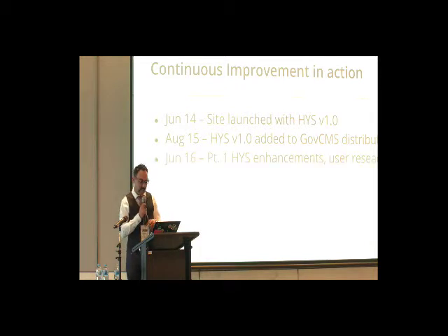And what we did then, about a year later, was create some enhancements. The first phase of that was to actually do some user research. We were able to carry out the user research with a specialist vendor, and it worked out quite well because we actually had a technical architect on board as well, who was able to translate the user research findings into a backlog.